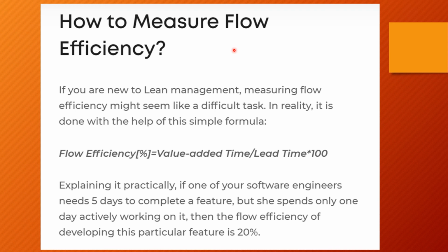So how to measure, this is the final metric we're going to discuss in Kanban, how to measure the flow efficiency. The flow efficiency is nothing but our value added time divided by lead time, multiplied by 100 actually. So I will give you a simple example here.